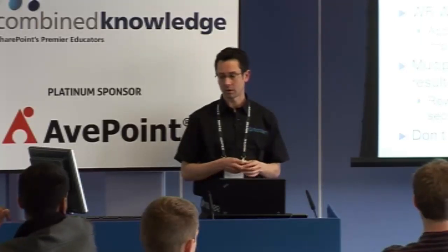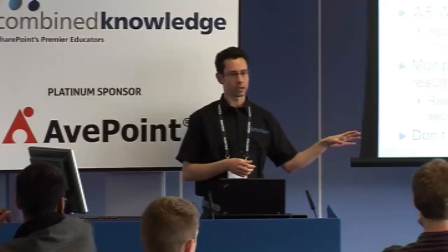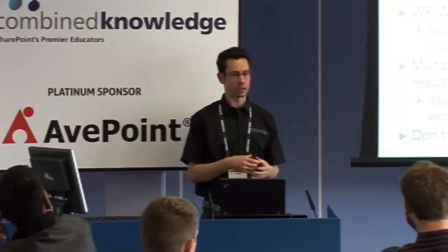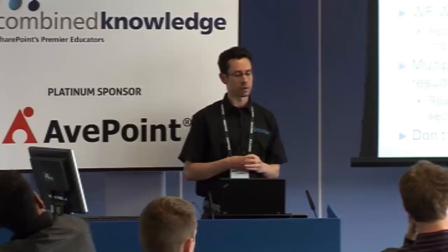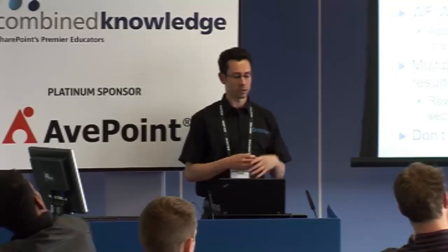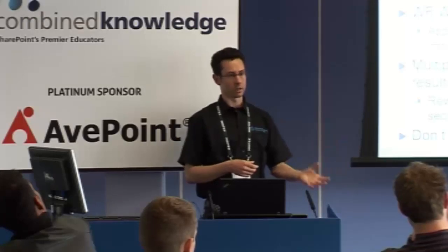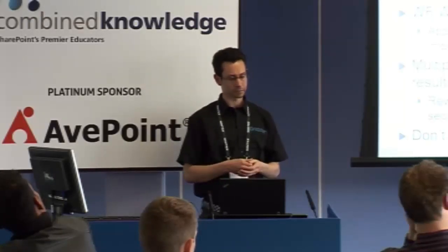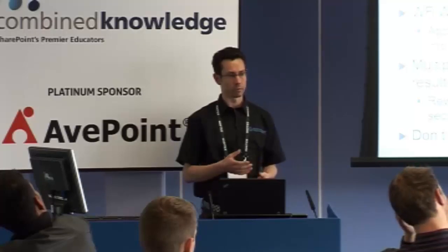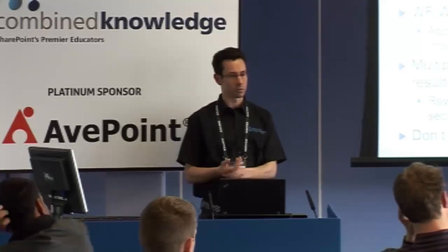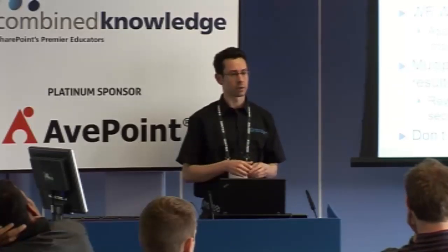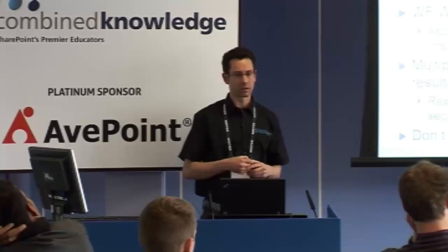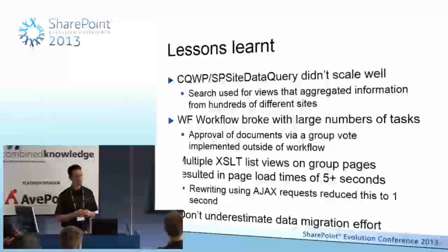We also were migrating from an old system. It was Oracle based, and the files were stored on the file system. Although there wasn't massive amounts of data, I think there was maybe 50 gigs of documents, there was a large amount of structured data, such as the organizations, the roaming partners, to migrate. And that basically involved 2 people from Concentra and 2 people from the GSMA for several months building tools to migrate that data. So be careful not to underestimate the time data migration takes.